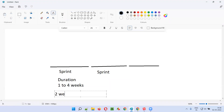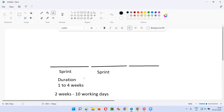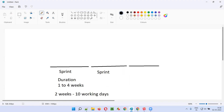Ideally, most of the projects have two weeks as a duration — that is 10 working days. In those 10 working days, the work assigned to the sprint needs to be completed. In the beginning of the sprint, some work will be assigned in the form of requirements, that is user stories, and those user stories need to be developed and tested by the end of the sprint — which is two weeks, or 10 working days.